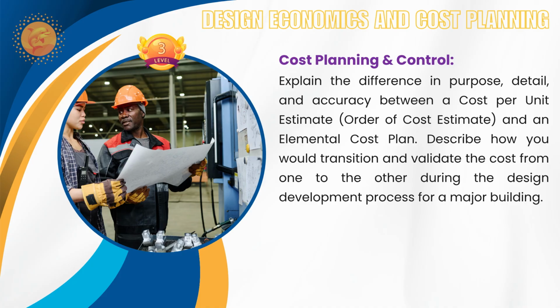for the particular populated cost of your in-house data. So once you do that one, then you may bring some of the regular suppliers, subcontractors who are ready to share the informations regularly with you. Maybe some of the specialist subcontractor you will take and reconcile how it is going to impact at further level of detail. So you will apply them to the next level. So this initial total estimate and the budget, that will be explaining your variance. So that is helpful in transitioning from one level to other. That's what it is important when you are applying your cost plan.